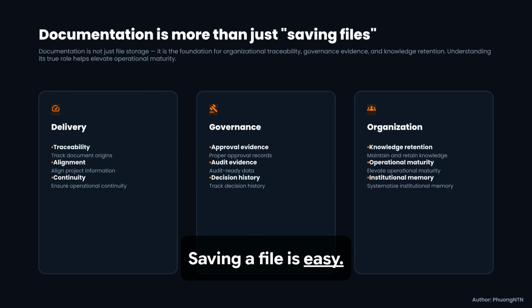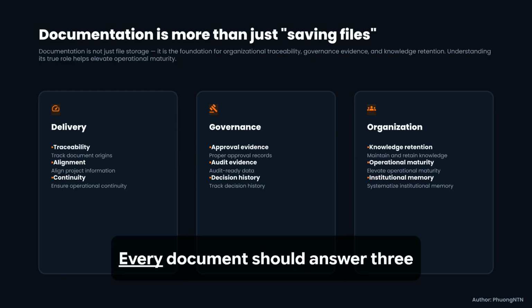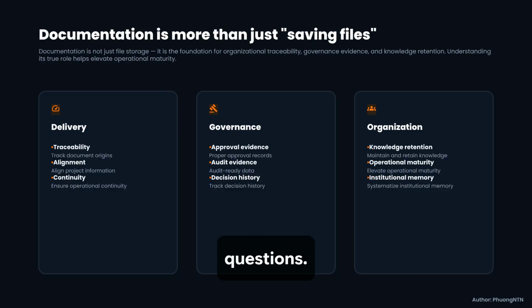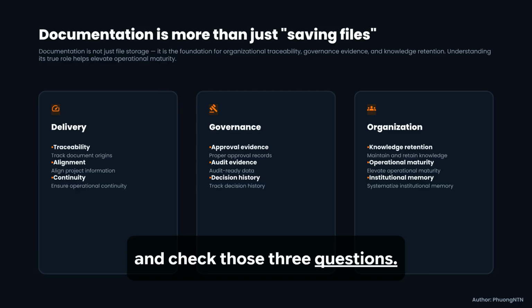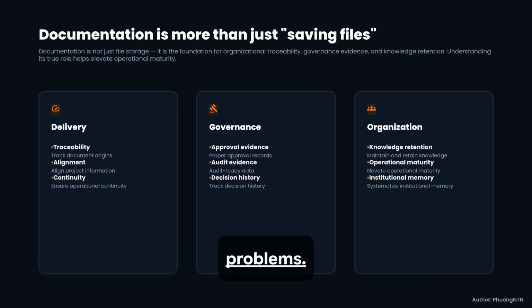Saving a file is easy. Managing knowledge is different. Every document should answer 3 questions. Where did it come from? Who approved it? Which version is valid? Before uploading any file, pause for 10 seconds and check those 3 questions. That simple habit prevents many future problems.